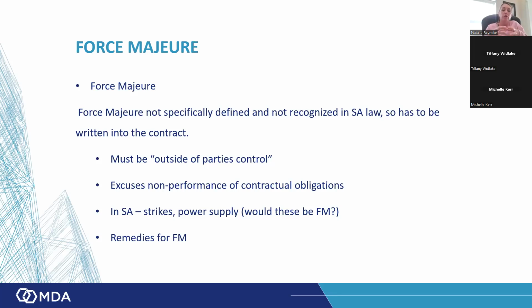So it is a no fault clause. No fault means that it's not the fault of the employer and it's not the fault of the contractor. So the no fault clause will generally either be entitled only to an extension of time. Perhaps in some instances, the employer may agree to pay you certain costs during that time period.